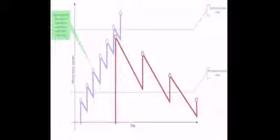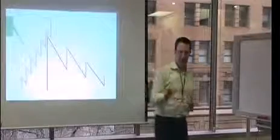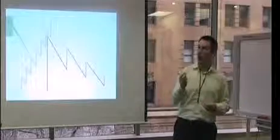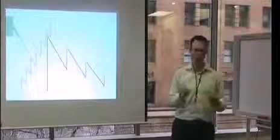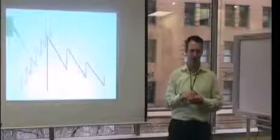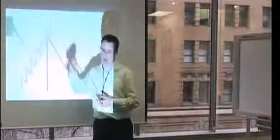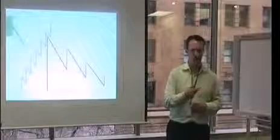If this is a waterfall project in red, the touch points between each release are actually quite big. And the problem with having touch points that are so big is that you don't always deliver the highest return on investment at the same time. I think the stat at the moment is about only 60% of functionality is ever used on any waterfall release. So I need to try and break that. And how I break that is by delivering smaller pieces on a regular basis and asking my client every month, 2 weeks, 2 months. So what's next?